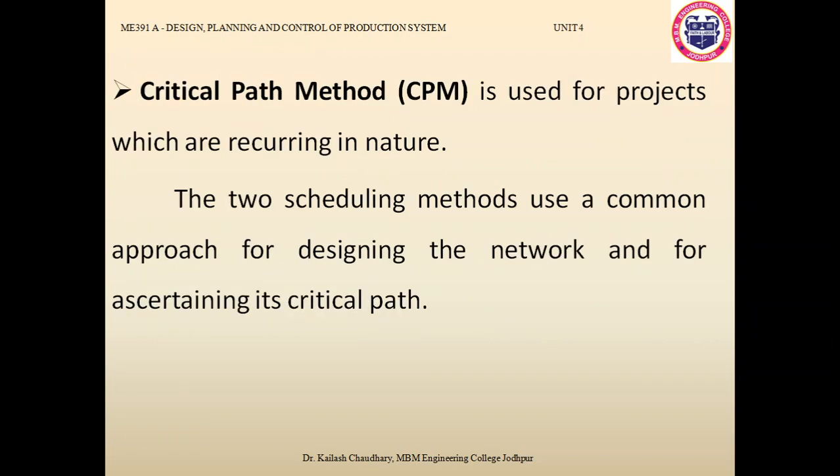While CPM is used for projects which are recurring in nature, which are repetitive. These two methods are common approaches for designing the network and for ascertaining its critical path. So using these two techniques, we can get the critical path, which gives you the idea of the total time required to complete a project and the total cost required to complete that project.